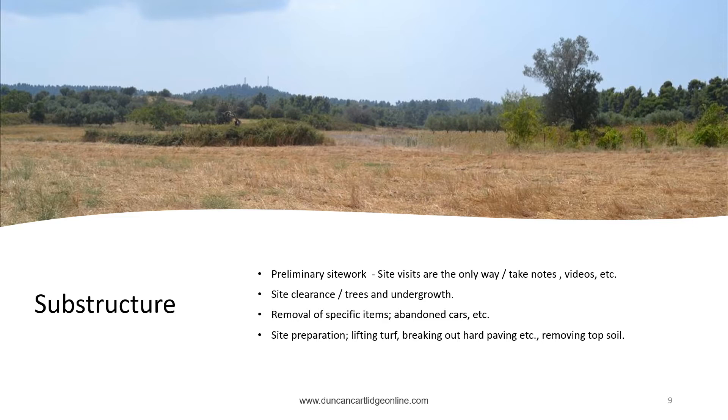When building on virgin sites a considerable amount of preliminary site work may be required. There is only one way to assess the extent of the work to visit the site and to make notes and or take videos. Urban sites in particular can be dumping grounds for all sorts of items large and small. I once remember a site where we discovered a large safe, it was empty I should add but it was very heavy and needed considerable effort and cost to remove. All such items must be logged and included in the bill of quantities or work package.